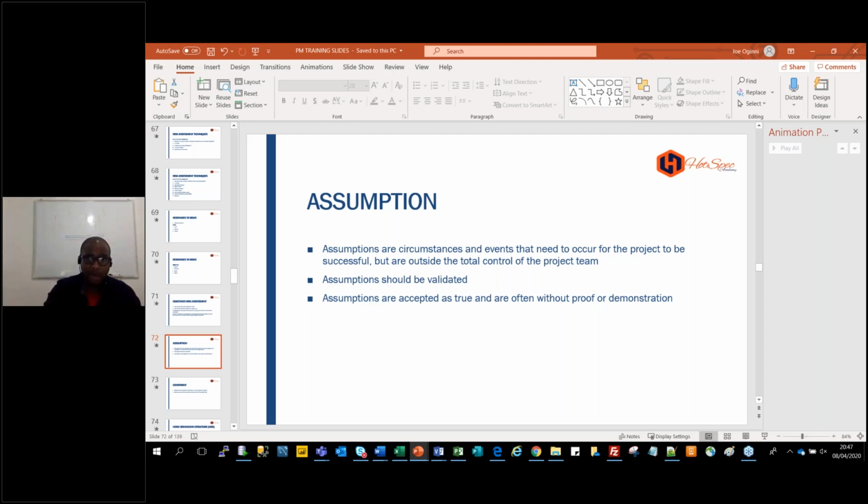But by the time I come, I must have given you the document to read, including the assumptions, and you can now flag it to me that, oh, sorry, I don't have that. Okay, now our scope is changing. So you want me to install the operating system for you now. Now the scope is going to change, your budget has got to increase because the cost is going up. So we'll go to that.